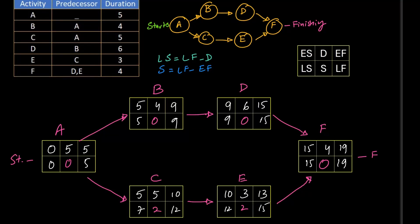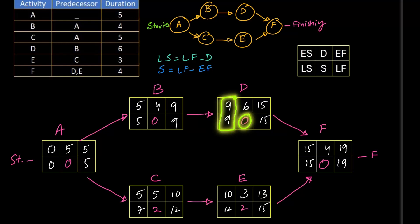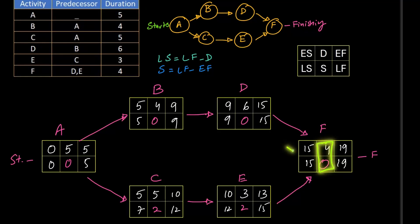Slack is the most important part of the CPM. If slack is 0, that particular activity cannot be delayed. It has to start and end at a particular time. For example, B has a slack of 0 means it can only start at week 5 and it has to be finished till week 9. Similarly, D has a slack of 0 means it has to start in week 9 and has to finish in week 15. F, the last activity, has a slack of 0 means 15th week will be the one that the F activity starts, until 19th week it shall finish.